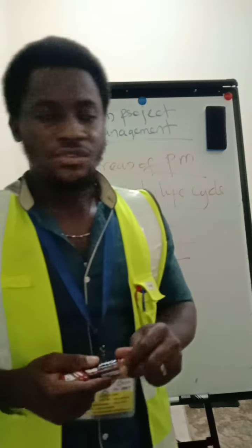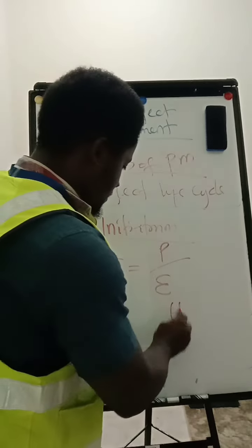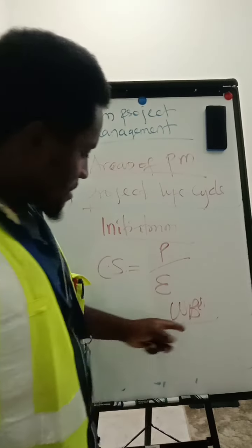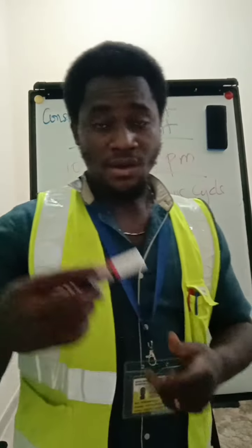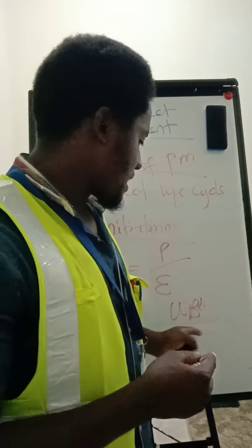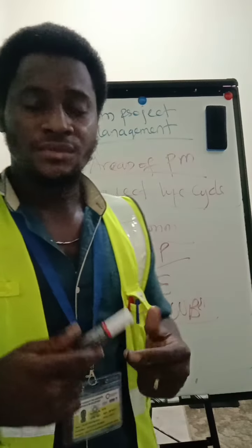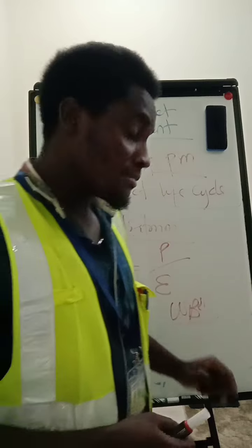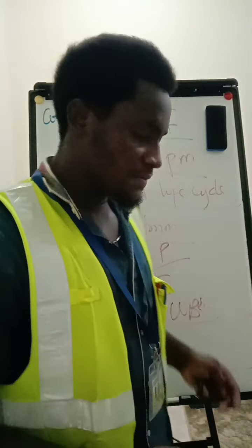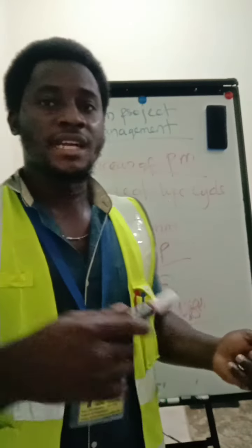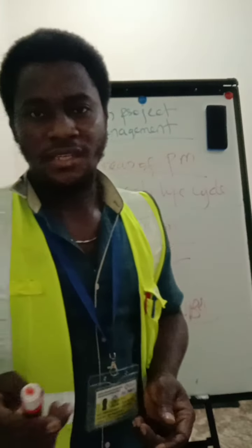So next, we'll be talking about creating a work breakdown structure, which is WBS. With the work breakdown structure, we will be able to identify all the different activities that will be carried out as per the contract, put them down, and break them down into different sub-activities, right up to the level of work packages that we'll be able to monitor and control by the various team members, which is very important as well. Next we'll be talking of identifying the critical success factors, which is very important.